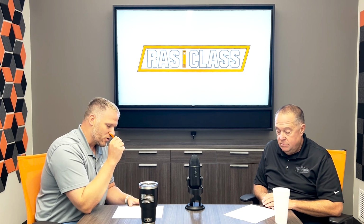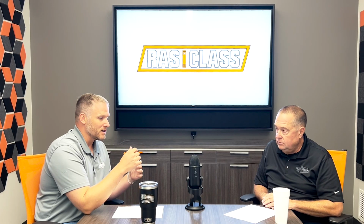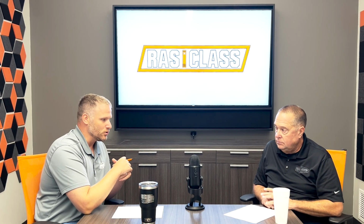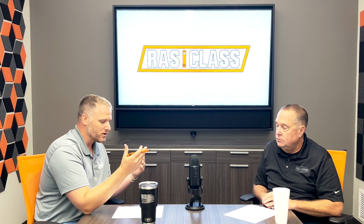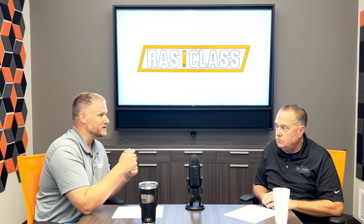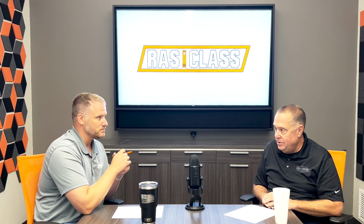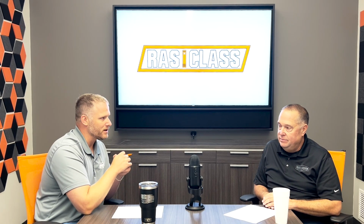Exactly. Right. So you talked about this like 5 to 7 day window. Is there anything that a customer can do? We talked about having a really nice level spot, I assume near the boiler room. What other things can a customer do to help get that boiler up and running as fast as possible? Have the tie-in points. Have your contingency piping in place. Can you explain what a tie-in point or contingency piping is?